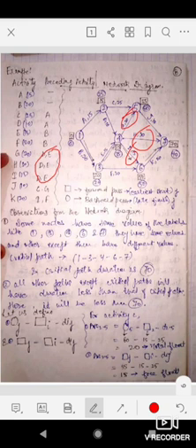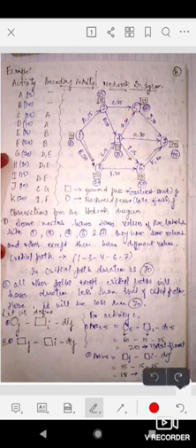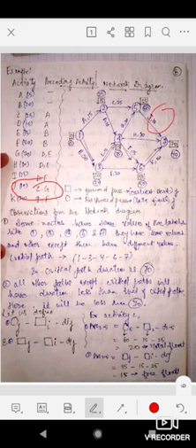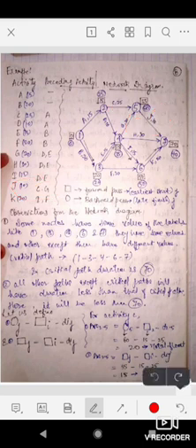So after completion of D and E at node 4, these three activities, G, H and I, will be started. Now you can see J is following activities C and G. At node 5 both C and G will be finished, and we can start activity J from node 5. Finally we have activity K, which is following I and F.